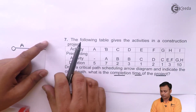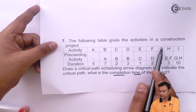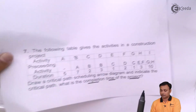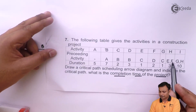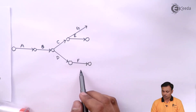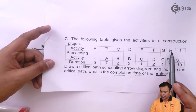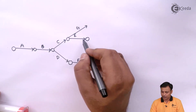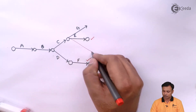So we have A, then B, then C and D. After C we have E and G; after D we have F. Now I need to join E and F, and from E and F I will have H. Then I need to join G and H to get I. We need to redraw the diagram to join E and F properly.